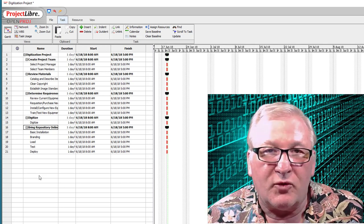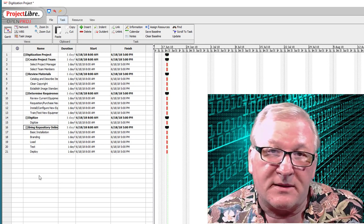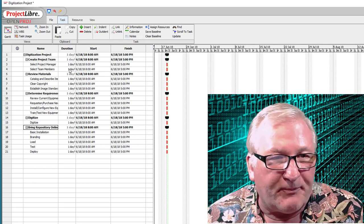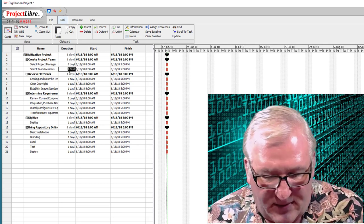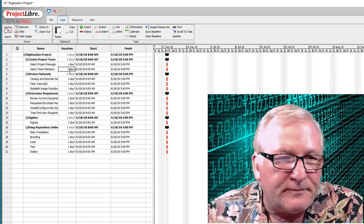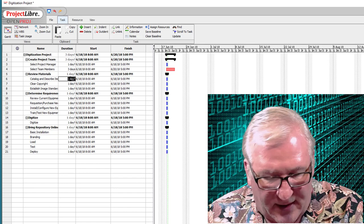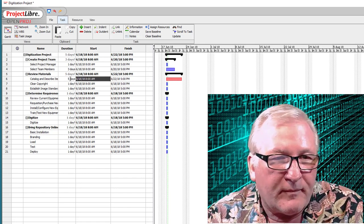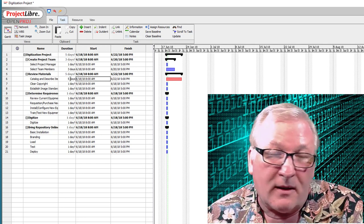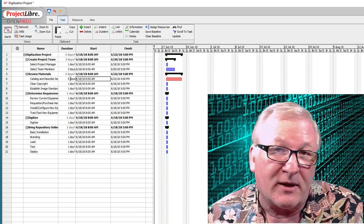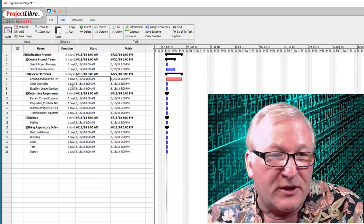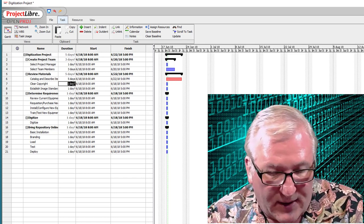Now we need to put in our estimated durations — something established in our planning session. I'm going to assume the Project Manager selection will take one day, selecting team members might take three days, cataloging and describing items might take one week. Notice it changes one week to five days. There is a comprehensive calendaring system you can use to adjust the work week length and schedule, but I won't demonstrate that. Clearing copyright is probably going to take two weeks.